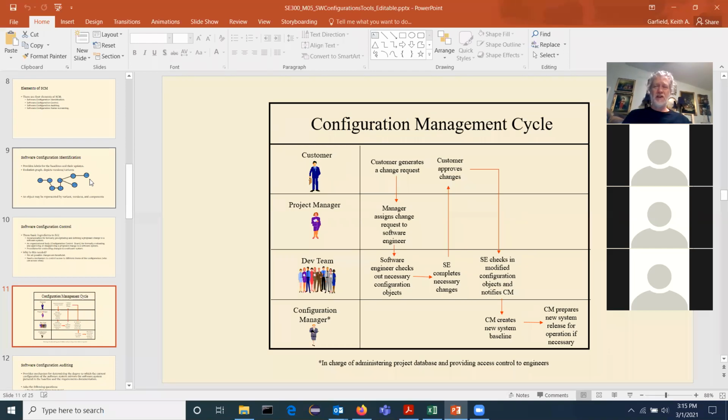Some companies will actually use that unethically. They do what's called buying in. They buy into the baseline contract by underbidding, knowing that the customer will change something. Then on the first change order that comes down the pike, they overcharge the customer to get back to a profitable stance. We call that unethical. They're buying in, and then when the change order comes, they call it getting well. So look out if your company's doing something like that; you might want to look around for another company to work for.